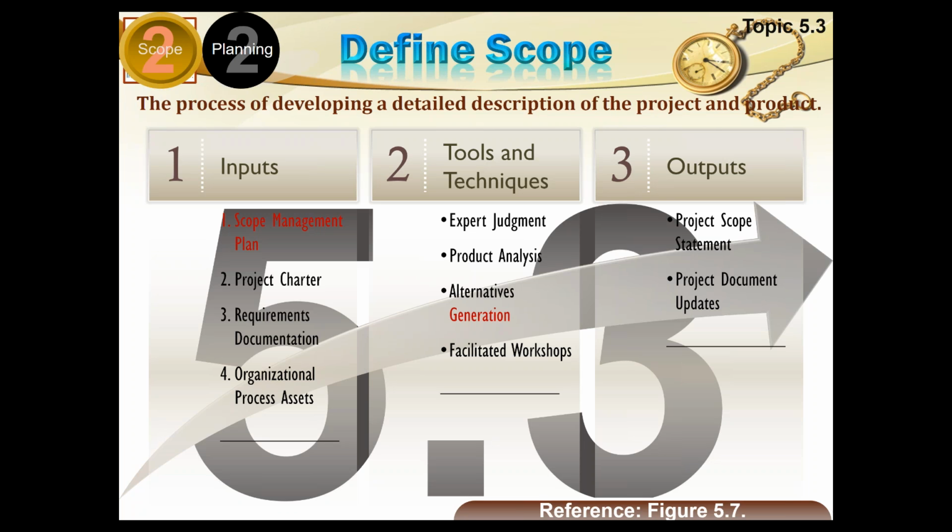Why are we doing the product analysis? Product analysis is to be done to determine the product scope. And how do we do the product analysis? We have all the requirements, and putting those requirements together, we try to bring it into the shape of a product. We imagine the product and we analyze how these dimensions fit into the product, and we compare it with the items available in the market similar to this product. So this is my product analysis, and this product analysis will also help me in generating the next item, which is alternative generation. Alternatives will be identified and generated.